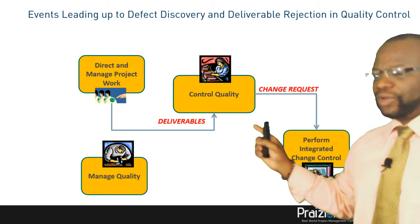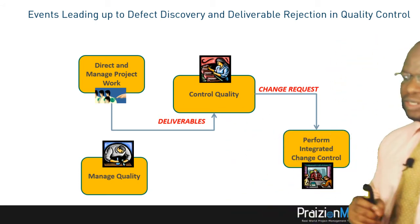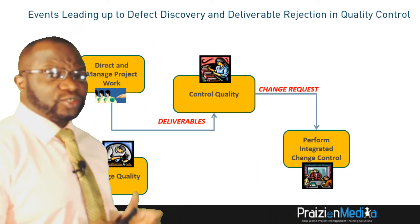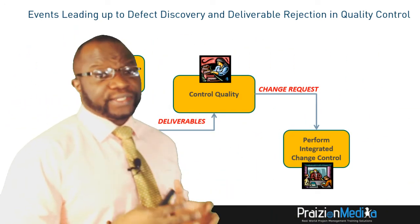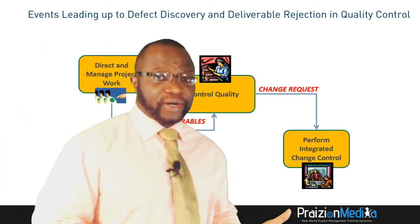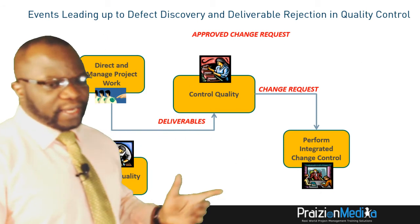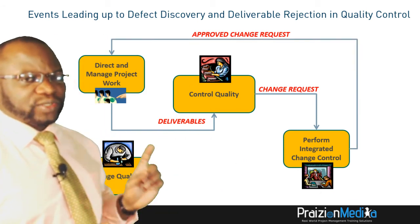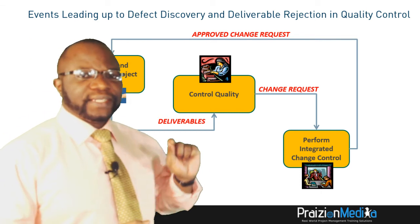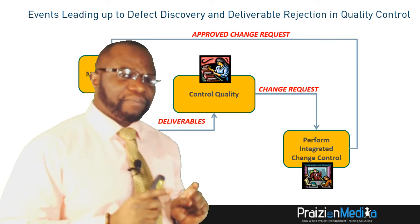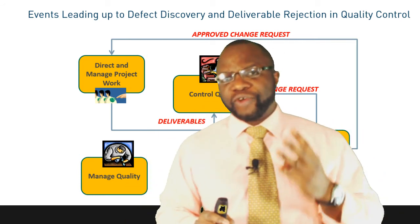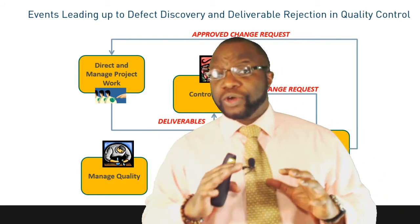That change request goes to Perform Integrated Change Control, where the change control board — or whoever is the approving authority — decides whether to approve or reject the change request. In this case, it was approved. But take note of the fact that this approved change request cycles back into Direct and Manage Project Work.